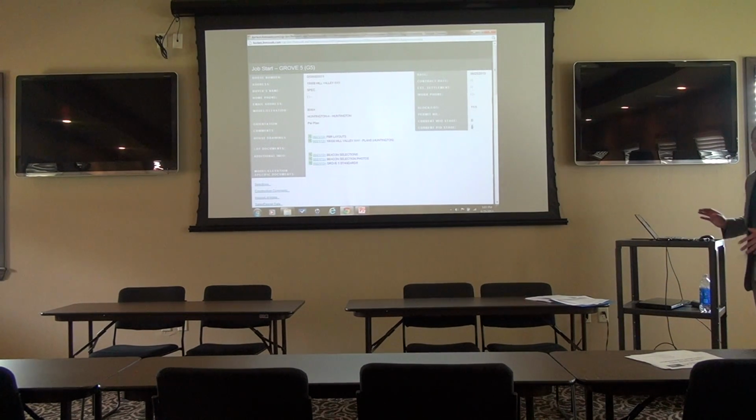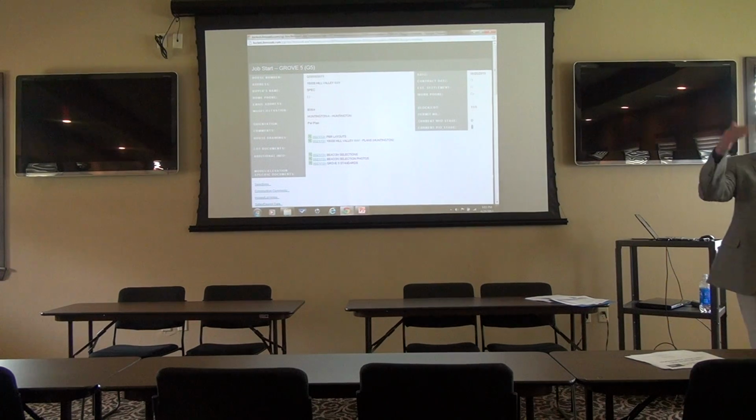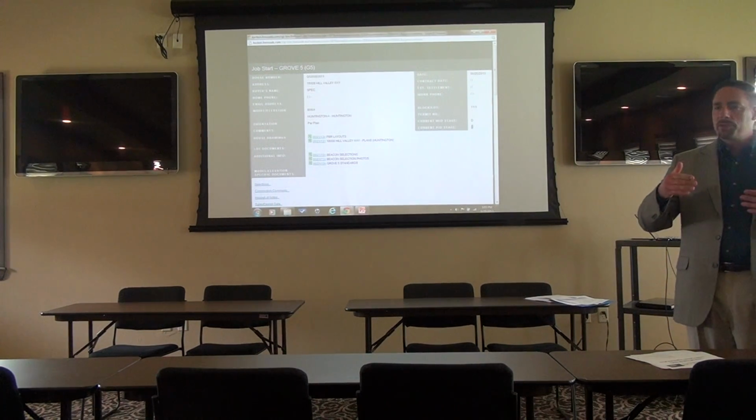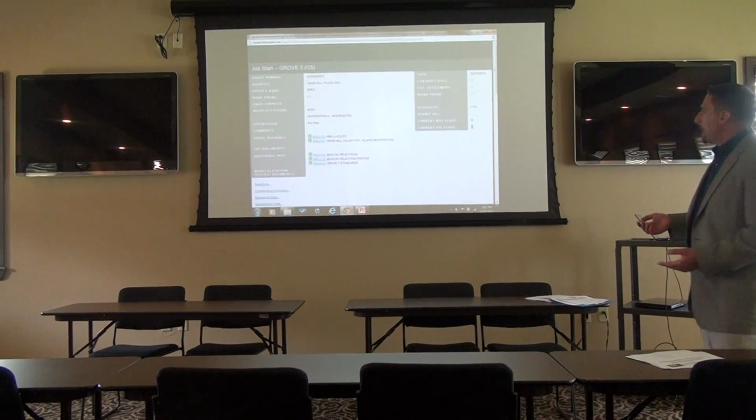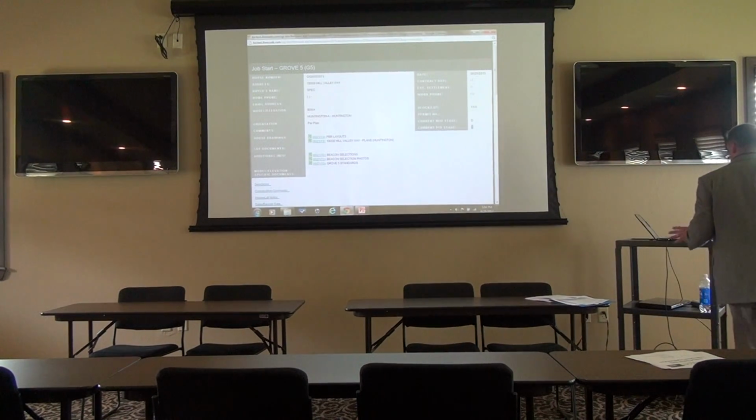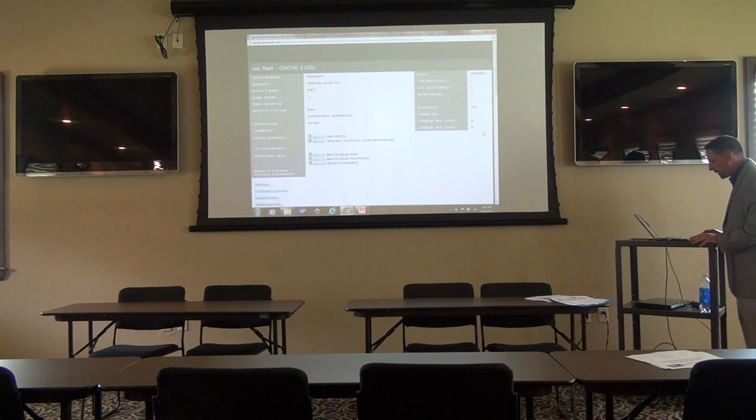So you know it's at stage D. Look at your chart, you'll see everything that was released through stage D. You know that the sales system is cut off from changing everything that affects everything up to stage D. But at stage D right now, there's some important documents for you to look at.